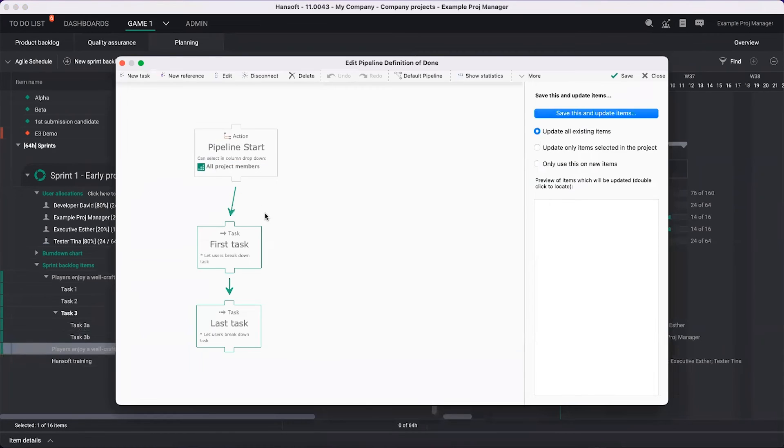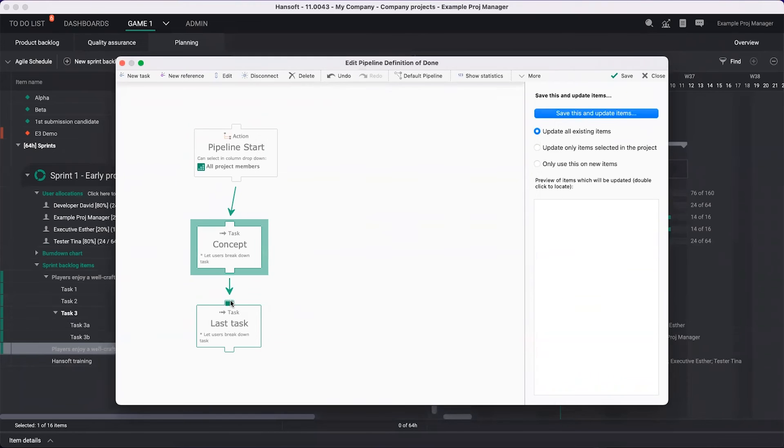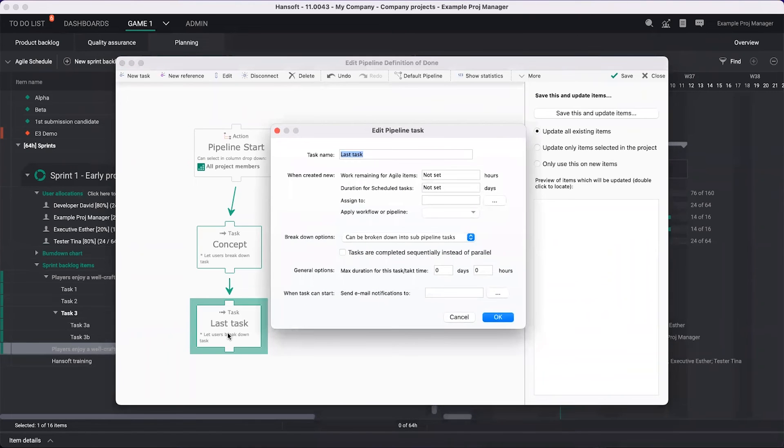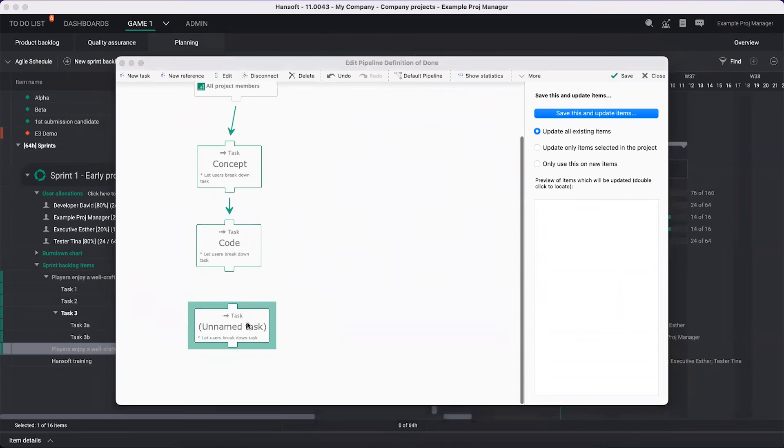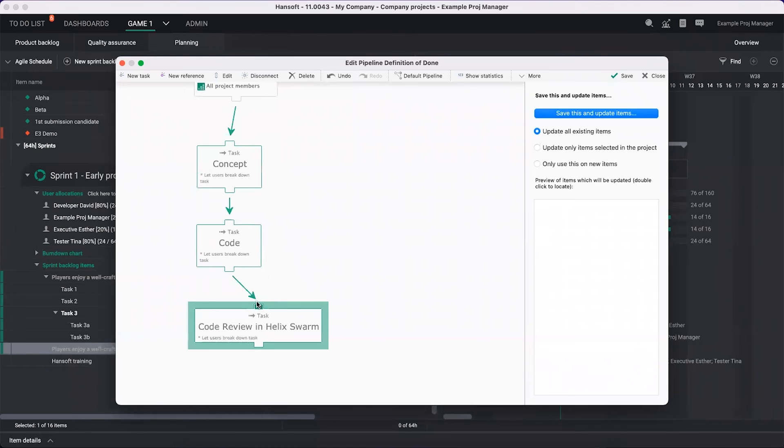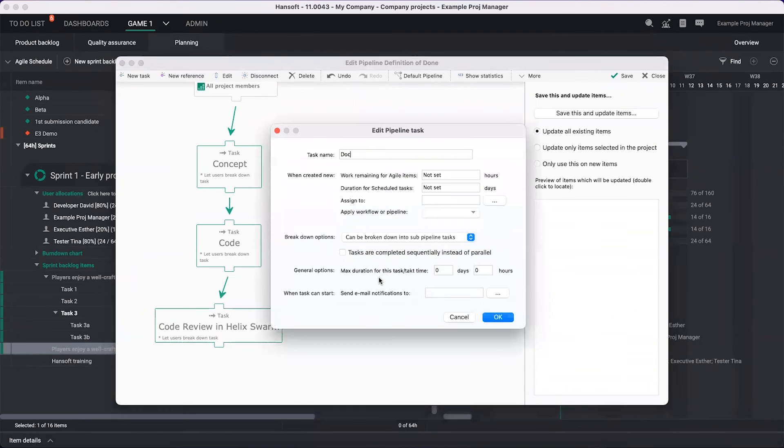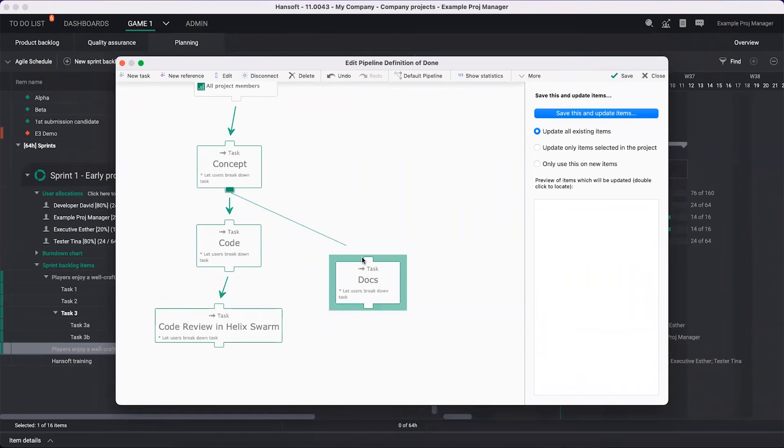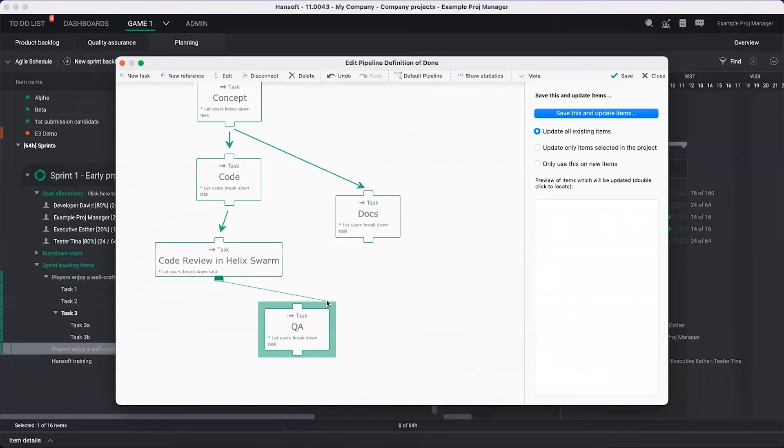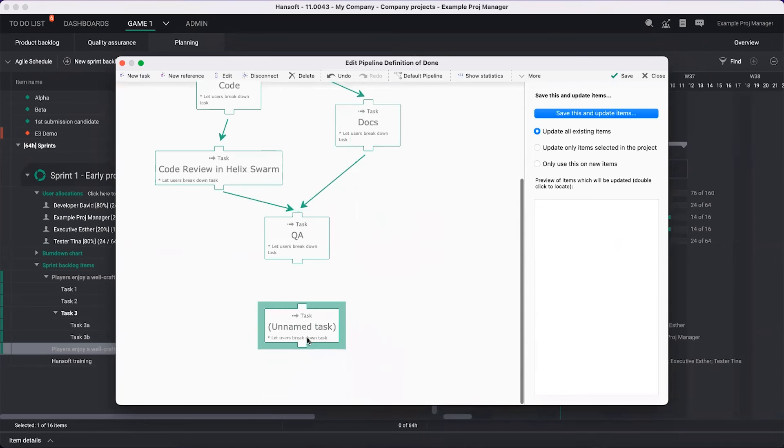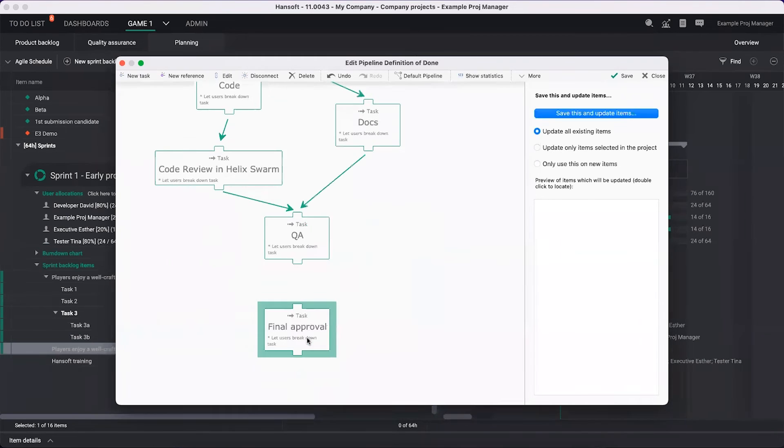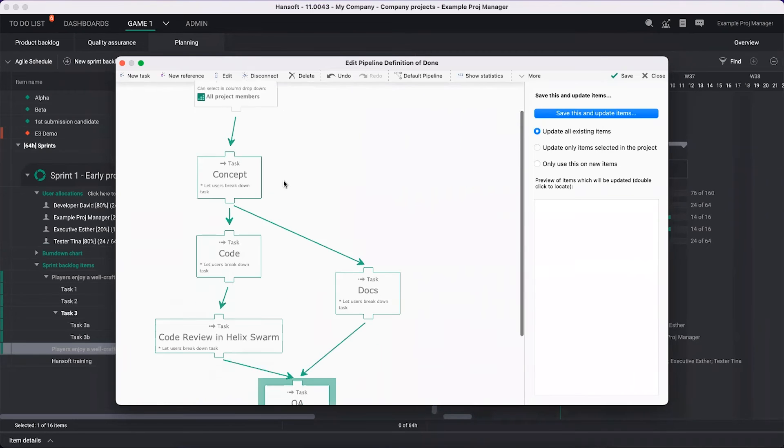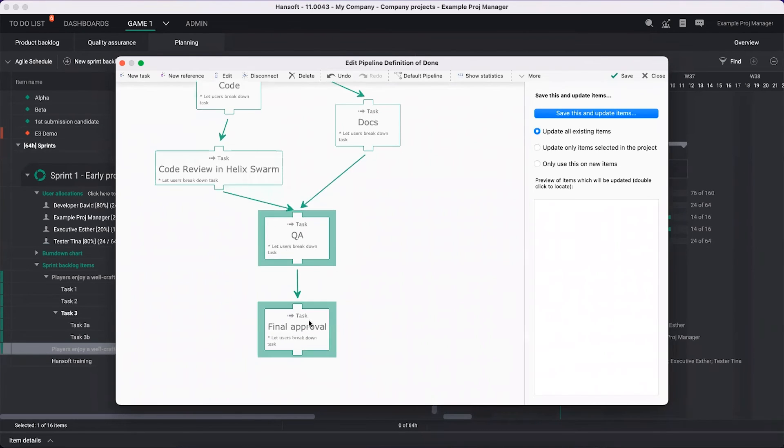You can build this up in many ways, but this is like a predefined way of breaking down your work. It could be that first we're going to do some concept about this. Then we're going to code. Then we're going to have a code review. Then we could work on some documentation here at the same time after we've done the concept. Then we might go to QA. And then maybe we have a final approval. This can look any way you want to. The whole purpose of this is that you're going to reach some sort of done state by the end of this.